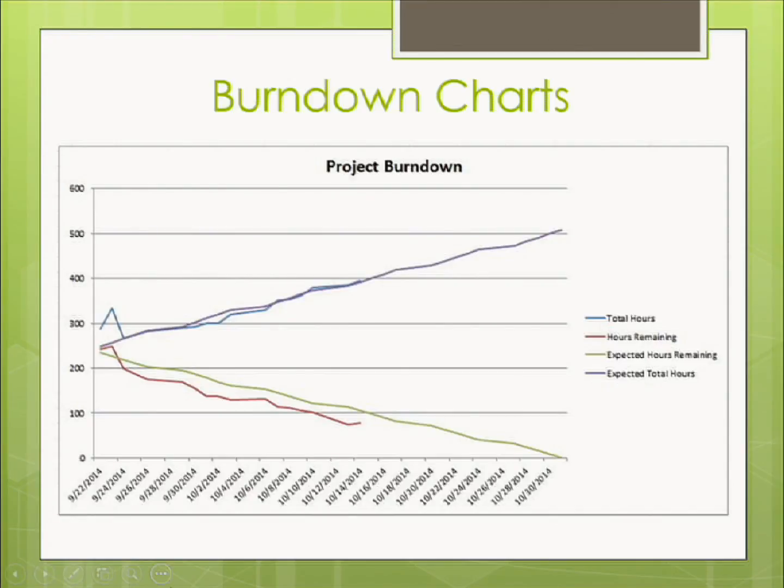There's 2 people on this project, me and a BA/tester. I'm looking at this and I'm like, I am 20 hours ahead. If we get one bump in the road that delays the 2 of us for a day and a half, we're suddenly behind. Well, all the management people saw this and said, oh, hey, we're ahead of schedule. We're doing good. I'm looking at it like, oh, crap, there's a lot of risk here.